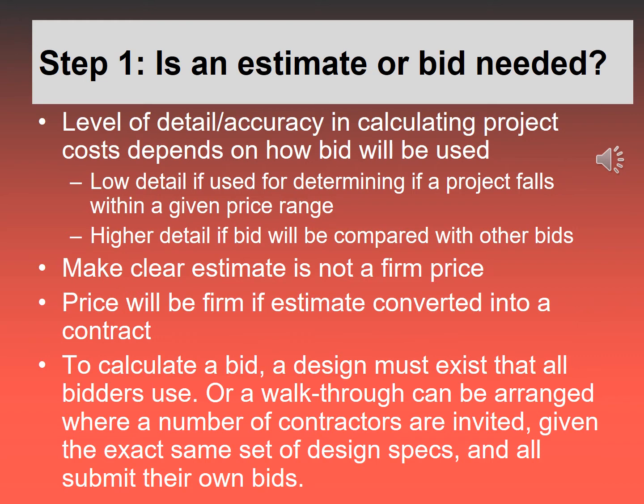The unfortunate thing about public agencies is that they force us to choose the lowest bid to make sure that it's fair and we're getting something least expensive. But it also often happens that then you have to choose the company that does the lowest quality work too. So that's a negative. So an estimate is general. A bid is much more specific. A bid can be just from one contractor, but by nature of the word bid, it's usually something that's used when you are having a number of contractors bid on the same project.